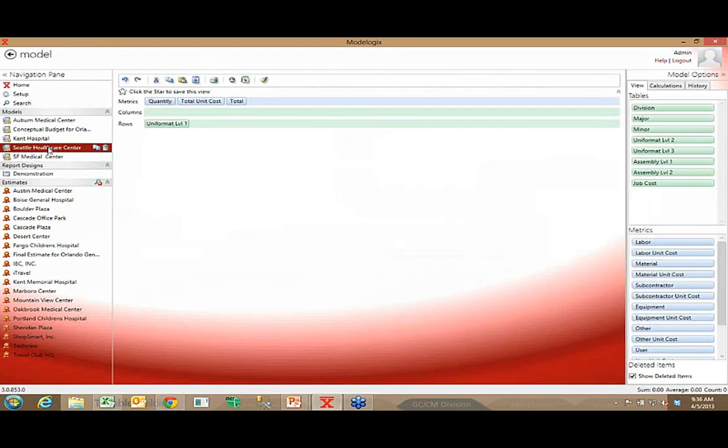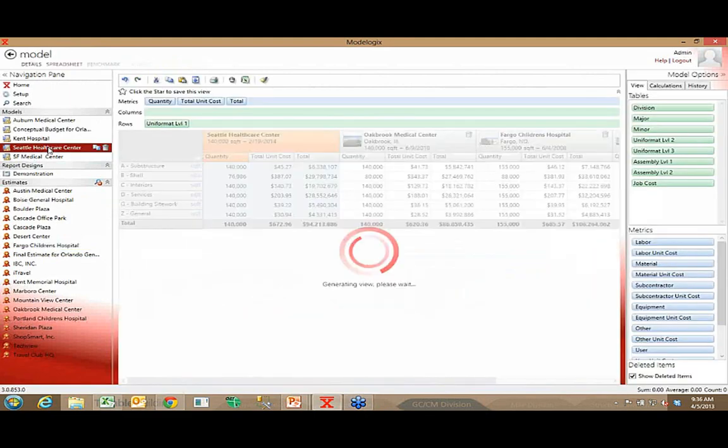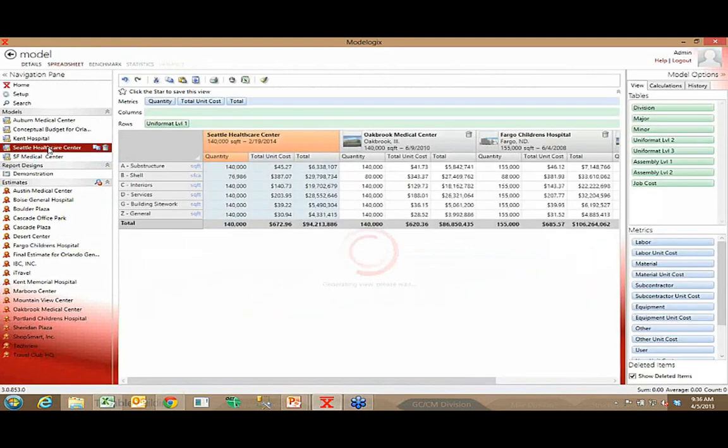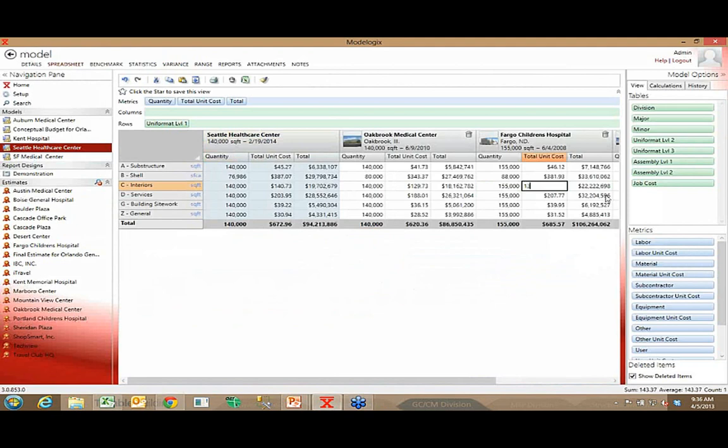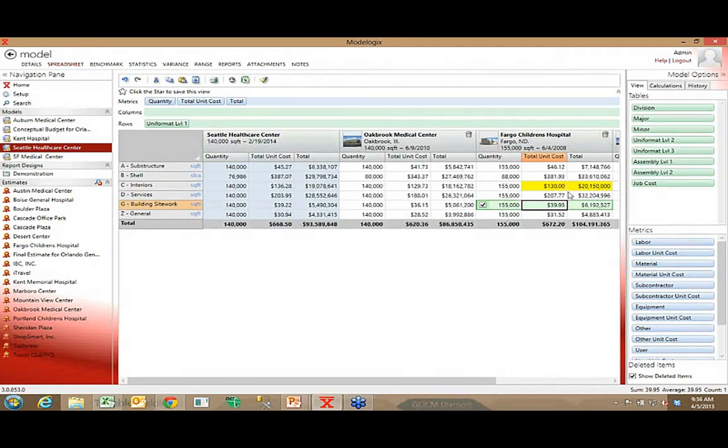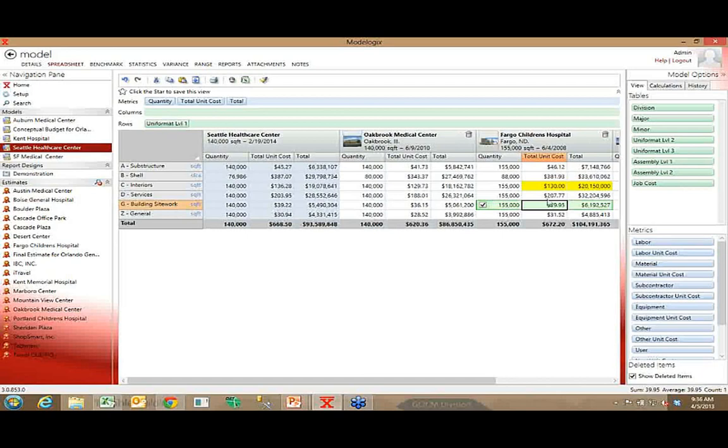It could be after reviewing those plans that I do understand better why that interior cost was what it was. So I could come back here and say, I want to knock that number down to $130 per square foot. Modelogix is smart enough to know to highlight that in yellow to let me know that I manually overrode what was stored in the database, normalized to Seattle in 2014. I overrode that number and put in a specific number.